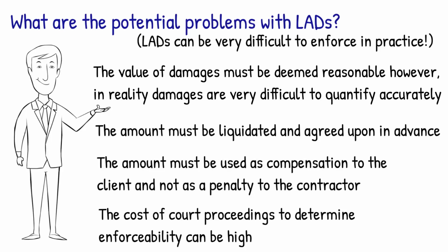To summarise, LADs can be a good way for clients to feel more secure and limit risk on their construction project. However, the value must be calculated accurately and reasonably. Simply adding a figure that is disproportionate to any actual loss would see the contractor contest the claim and very likely win if the dispute ever made it to the courts.